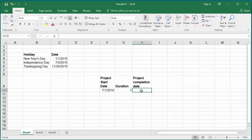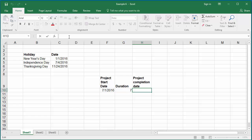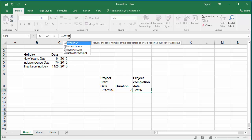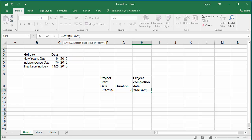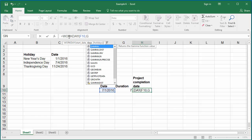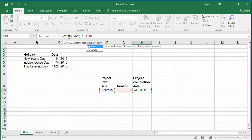In the formula bar, type equal to the function WORKDAY. Within the parenthesis, cell F10 which contains the start date of the project, comma, cell G10...